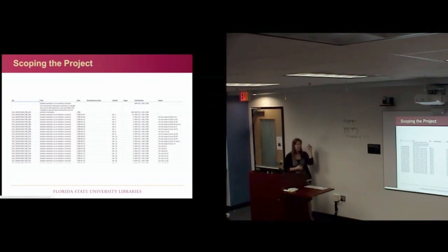And then the other thing we'll do with this inventory spreadsheet is we'll look at any preservation concerns and where those sorts of concerns might exist in the workflow of the project, whether they need to be taken care of before, whether it's something a DLC staff can take care of during digitization, they'll refolder or rehouse materials as they work, or is it something that needs to be taken care of after, where you're going to send all of the material you've been working with to someone else to take care of any preservation concerns that might exist.